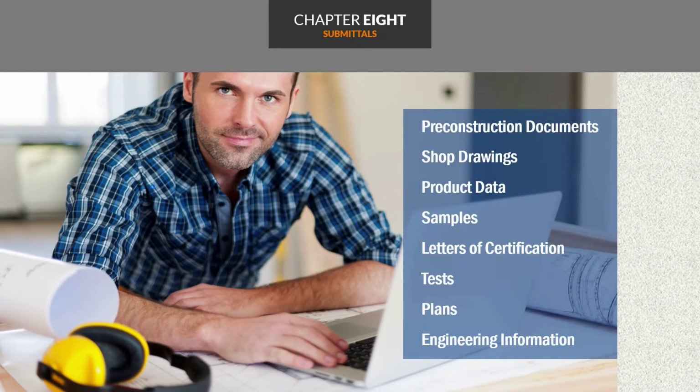Submittals include all pre-construction documentation, shop drawings, product data, samples, letters of certification, tests, plans, and other engineering information that may be required for quality control and quality assurance, control of the quality of materials and equipment, as well as compliance with the overall contract requirements, and require timely review, testing, and other evaluations. Submittals must be prepared in time to allow your quality control organization to review and certify, or as required, order corrections of submittal materials prior to providing the submittal to the government.